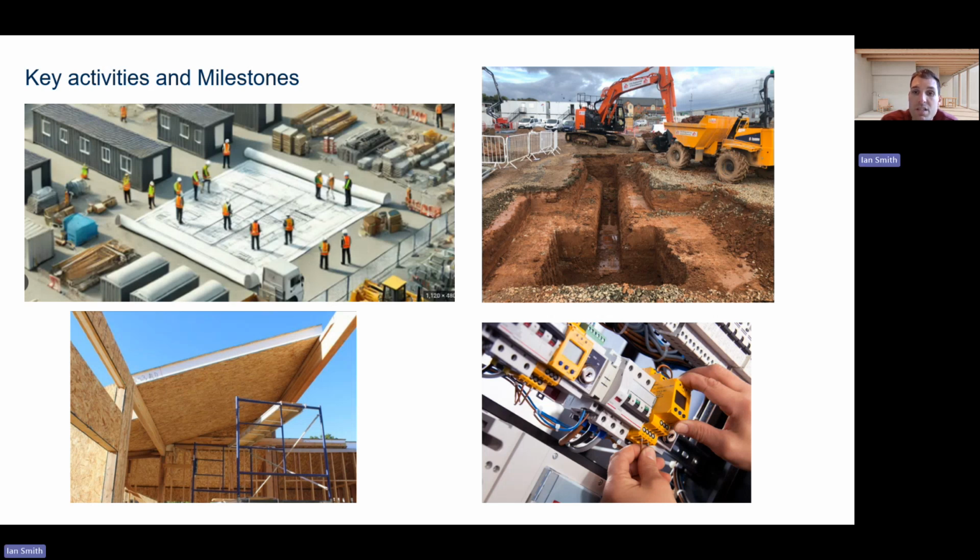The next reportable activity is the construction of the superstructure, which will in this instance include our SIPS panels framework. This phase is critical because it establishes the main structural framework of the restaurant building. Completing this on time allows the building envelope to be installed.